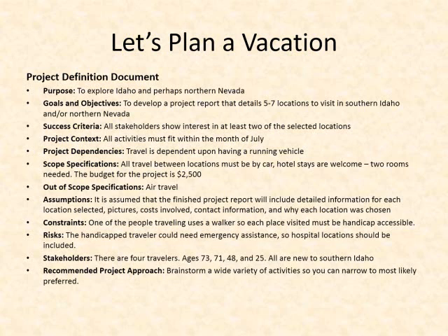We do need 2 rooms wherever we go. And our budget for this project is $2,500. So by having me tell you that I want to travel by car, you know that air travel is out of scope specifications. And something that I didn't tell you directly, but that still falls out of your scope specifications,